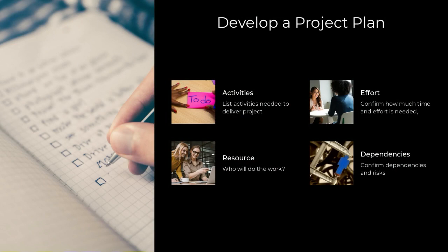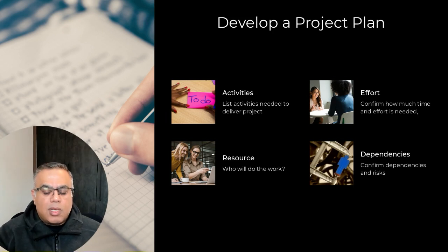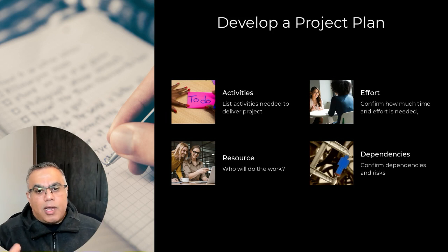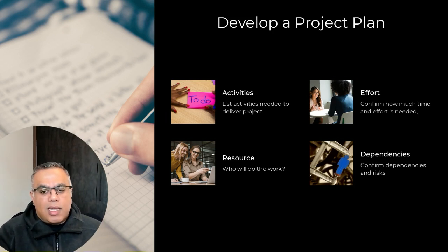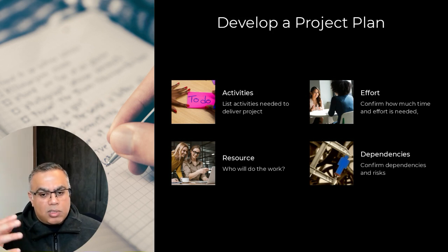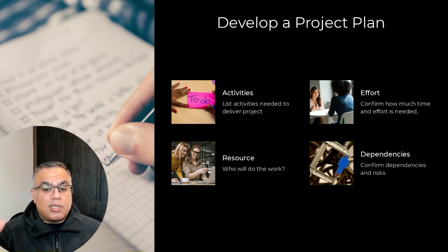Do you break your project down into work streams? I personally like doing work streams. Some people like to do sequential, which I find a little bit more confusing. But ideally, do your work streams, understand what that work stream requires to get delivered. Then you assign your resources and the amount of effort and time, which gives you a clear steer of how much effort is needed to deliver.